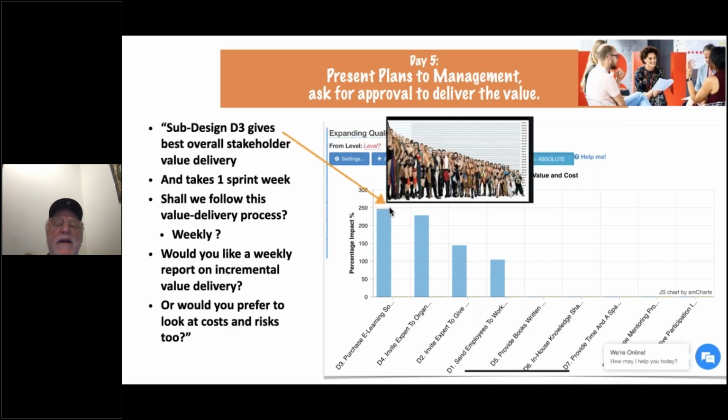Day 5, we choose this one, and we've made our decision about what we're going to try out on the next sprint, and then we will measure whether we got anything like this. And if we get approximately what we thought we'd get, we say, we know what we're doing, let's continue doing it, let's do this in the second week. If, for example, we got something really much worse than this, we have to sit down and say, why did we estimate so much when we in fact got so little? Let's understand that, because anything else we do now is just random, and we could be very wrong on all of these. We obviously don't know what we're doing with the technology we selected, and hopefully we find some better way of doing this.